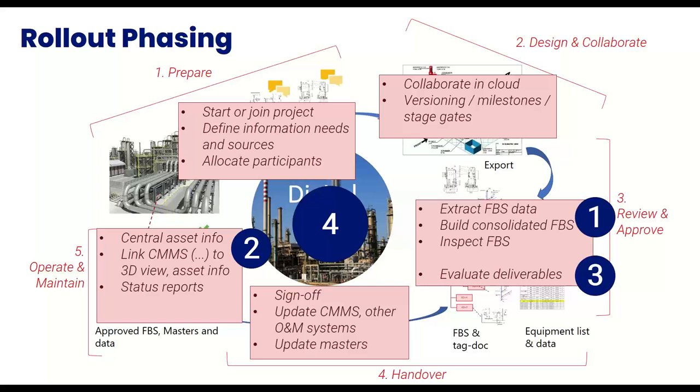At this point, we can start thinking about data governance and how this all fits together, and how we can make sure that the needs of the facility management processes are continually being met by the data that we get from the different projects that we do. With that data governance in place, we can optimize further by becoming proactive in formulating the data requirements. So knowing what data we need, and knowing what generally will be delivered by contract, we can start defining the data that we require at the end of the project, so that the stakeholders of the project know that upfront.